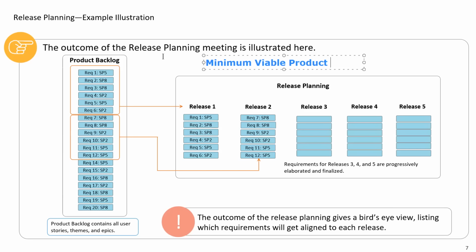Now, even before you go through the first release, should you first assess the viability of the product or project? Yes. Viability is assessed through a minimum viable product. Instead of releasing the product in the market, you build a minimum set of features that you can touch and feel, and you give a demonstration of these features to the relevant stakeholders, which may be business people, sponsors, or focus groups.